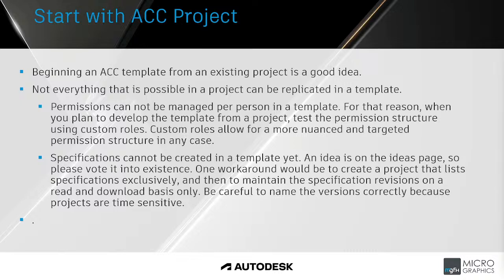For that reason, when you plan to develop the template from a project, test the permission structure using custom roles. So again, start with a project, use custom roles, and then custom roles allow for more nuanced and targeted permission structure in any case. That is true, depending on the complexity of the project, and we'll talk a little bit around that. The specifications cannot be created in a template yet. That is, to my mind, quite a weakness, but there might be a way around that. I'm still testing that, and I'd like to introduce you to that idea.